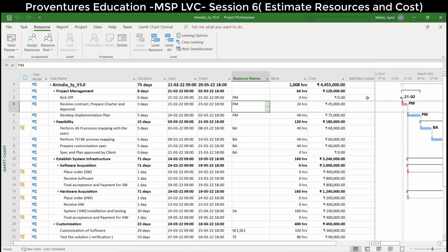Sam, one question here. Generally, from a risk management perspective, for contingency, is 50% okay or 20% okay from the project cost? It depends on industry to industry and company to company. You should maintain at least 10 to 15%. 20% would be a very big margin, and practically highly difficult.